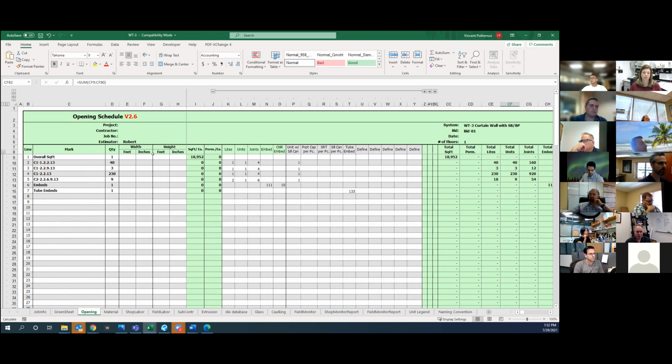And that's really just when we're talking about auto operators. Right. Because for any regular hardware, we're listing out what we have. Hardware is a tough one, and it's room for future improvement that I want to work on. Because we don't list out all hardware types. We basically have what standard hardware would be, and then adders for what it could go up to.